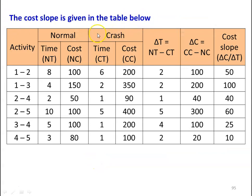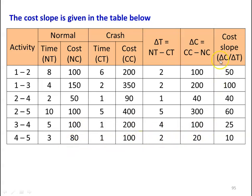Now we calculate the cost slope of each activity. ΔT values: activity 1-2: 8−6=2, activity 1-3: 4−2=2, activity 2-4 (shown as 2-1): 1, activity 2-5: 10−5=5, activity 3-4: 5−1=4, activity 4-5: 3−1=2. ΔC values: 200−100=100, 350−150=200, 90−50=40, 400−100=300, 200−100=100, 100−80=20. Cost slopes (ΔC/ΔT): 50, 100, 40, 60, 25, and 10 respectively.